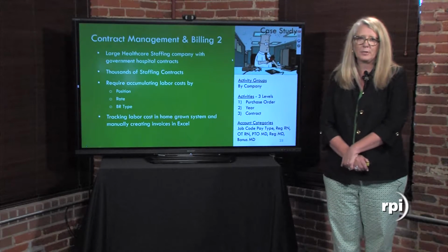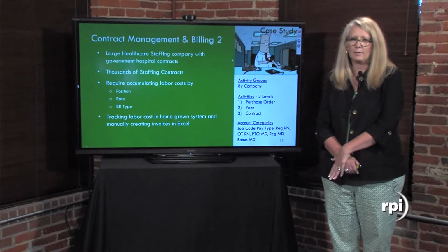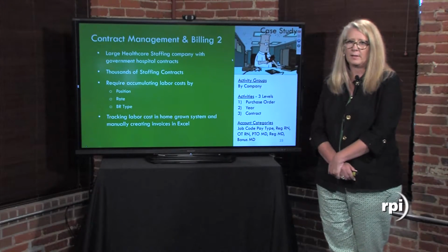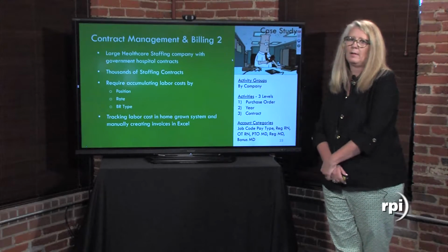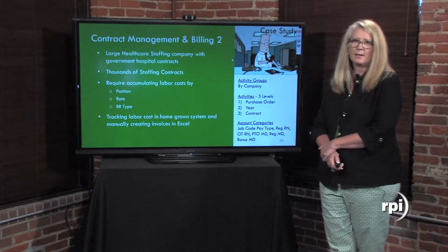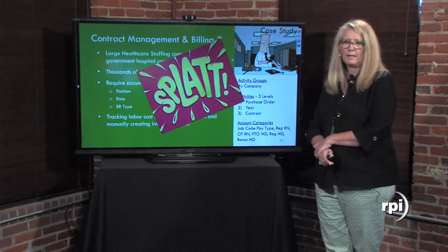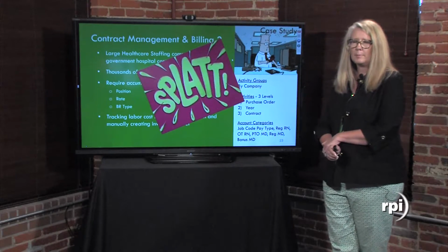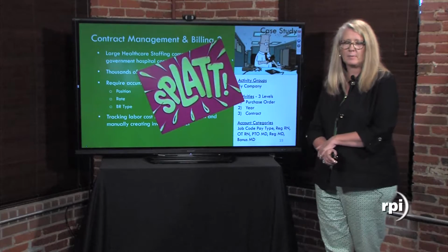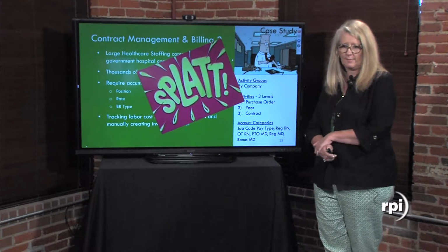And their account categories were defined at a very, very low level, such as job code pay type, such as regular RN pay, overtime RN pay, PTO doctor, regular doctor. Very, very detailed. And I think it took them probably 26 days before they got all their invoices out a month, and I think they get all of their invoices out in 6 days now.